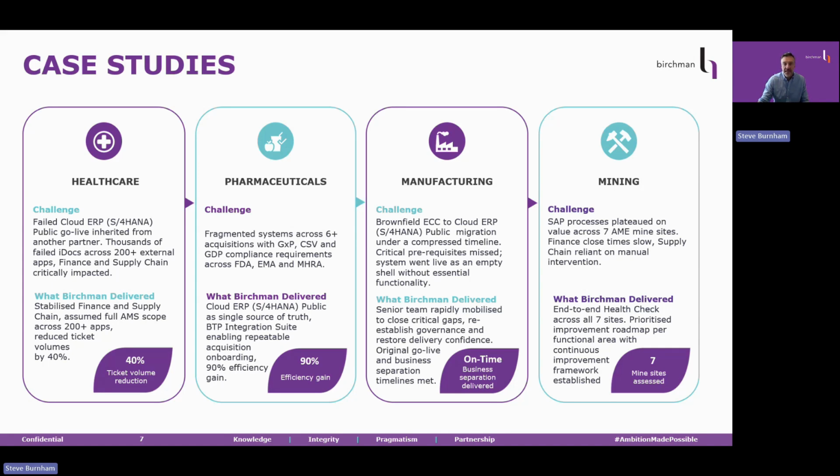We mobilized a senior team quickly, assessed the gaps, completed the missing configurations and data migration activities, re-established governance, and restored delivery confidence. The original go-live and business separation timelines were met, not a revised timeline, the original one. The plan was not recoverable, but the timeline was. These are two different problems and they needed two different answers.